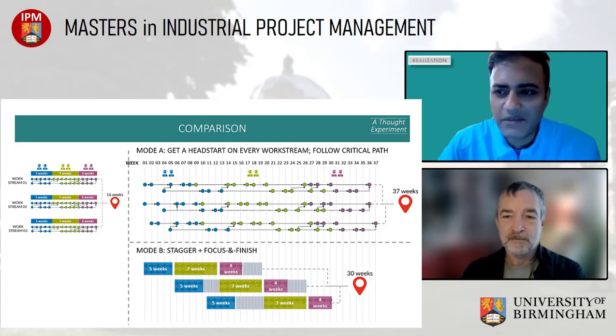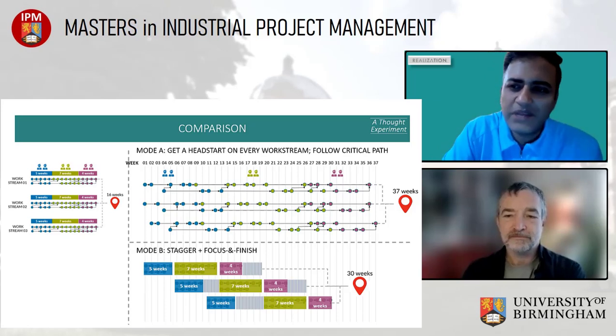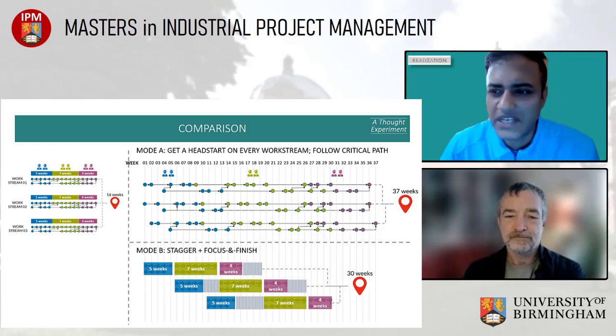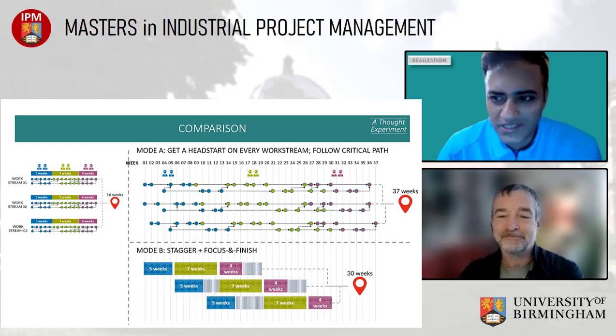So basically, we are still avoiding the problem. The problem comes when both the integration point and resource shortages hit us. So inside the box, there will be integration points, but we are not allowing the resource shortage to hit. So the problem should not arise. By doing this, we are enabling the frontline managers to allocate resources very efficiently. They don't have a shortage. They don't have to choose. They can just allocate their resources to whatever work is available.